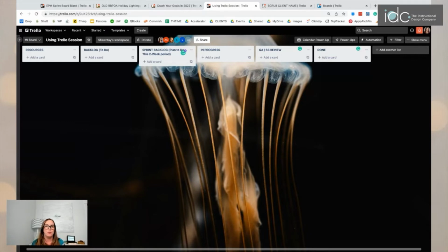But remember what I said before, I create my board and then I use that board as a starting place for future boards. So the heavy lifting, I only have to do the first time if it's a project that is a repeatable type of project. So for me as an instructional designer, building a course is a repeatable project. Building a Storyline course is a repeatable project. Building an instructional video is a repeatable project. There are certain things within that get repeated each and every single time. So I could just copy that board and use it as a starting point and then customize it for that particular project.